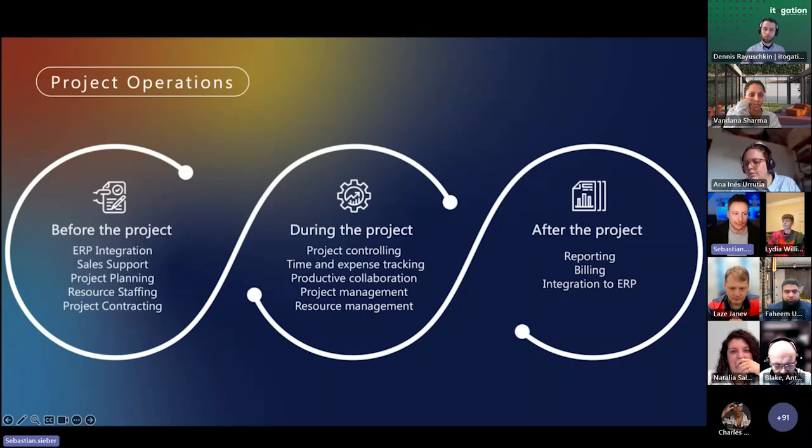So we are more from the Power Platform side, and we can change these little things very, very quickly and fast. So this ERP integration in the beginning for the sales data, and as well in the end when we have gotten through all the execution of the project, including approval and stuff like that, we create pro forma invoices, which we then as well can transport or sync back to the ERP, where we then do the real billing to the customer.